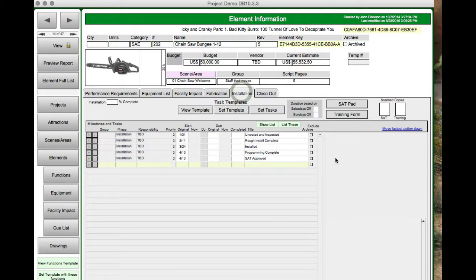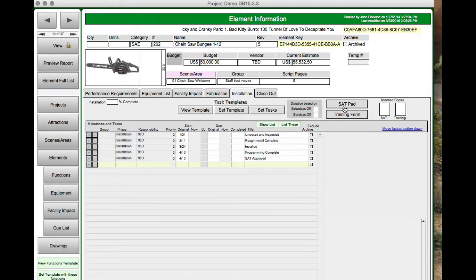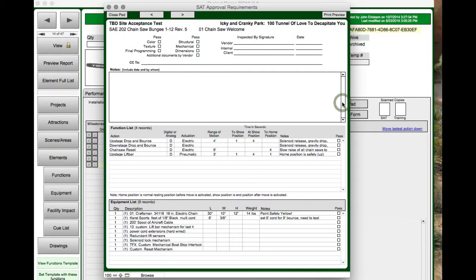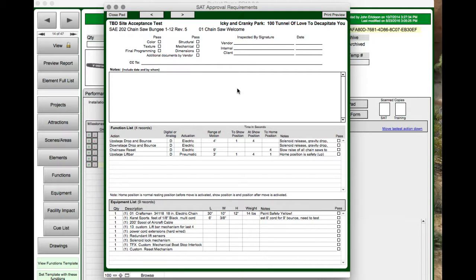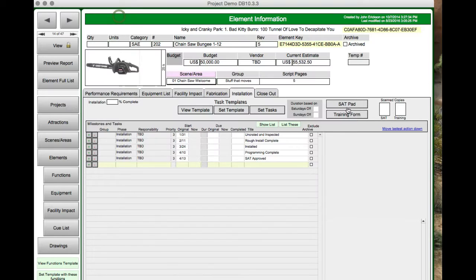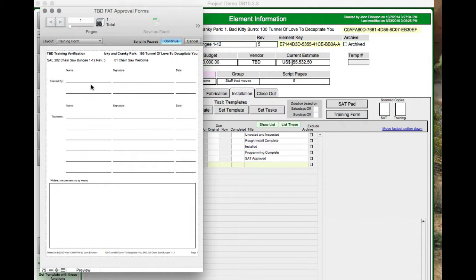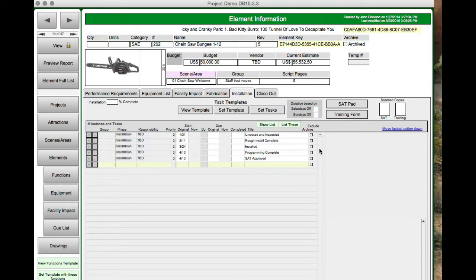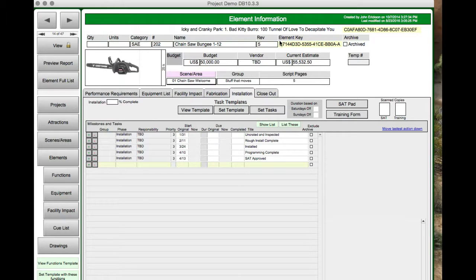Notice for fabrication and installation, I put up FAT pads and SAT pads, site acceptance tests. This is a default since the vendor usually comes up with that, but if they don't, this just takes your function list and your equipment list and a couple other things in the note area. You can print this out and tick off pass or fail. Then you can make a copy of it, scan a copy and put it in here. I also got a basic training form that does the same kind of thing - who trained, who was trained, and any notes you have. That way, scan and put them in there. A couple weeks later when the techs can't figure out what to do and said they weren't trained, you can go back and show them this. You still have to train them again anyway, most likely.